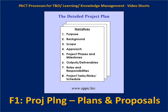It's better to clarify scope upfront and get that squared away immediately. The approach section covers what methods will be used in the project: will you be using surveys, interviews, observations of people performing, document reviews, or facilitating group meetings of master performers, subject matter experts, novice performers, managers, and supervisors — or not?